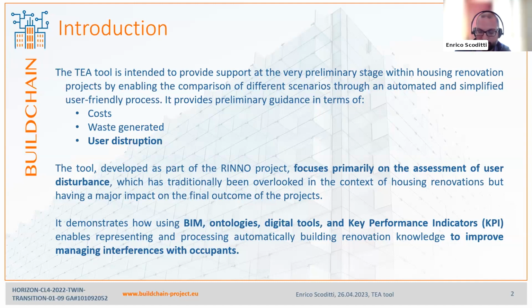To emphasize the non-negligible nature of this cost, it should be mentioned that research studies suggest that disruption can increase cost by up to 12%. In other words, user disruption and related costs are aspects that need to be kept in mind from the very early planning stage.